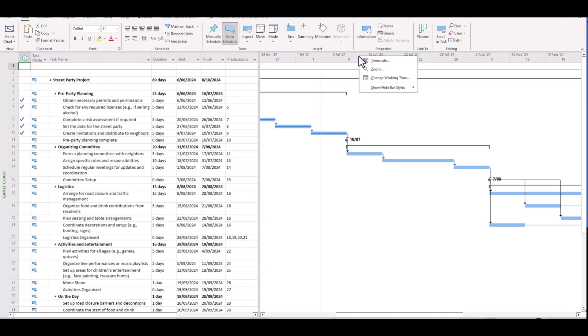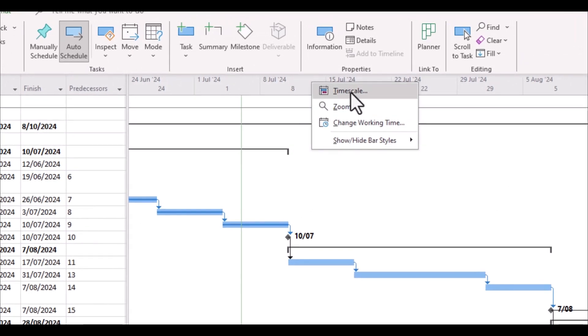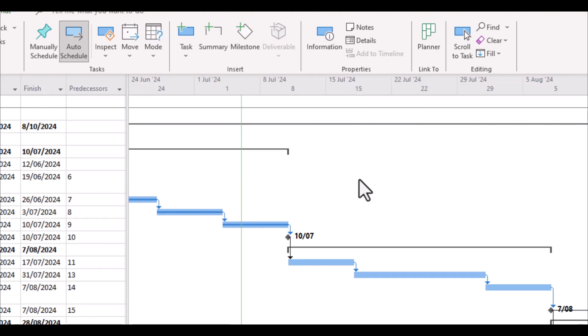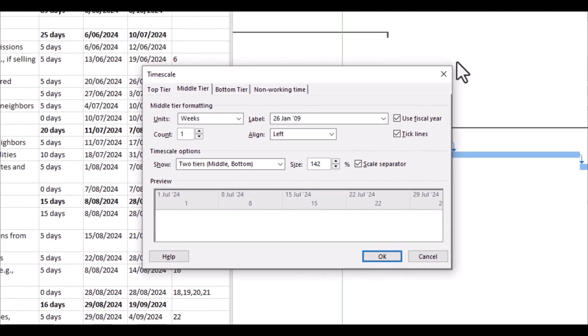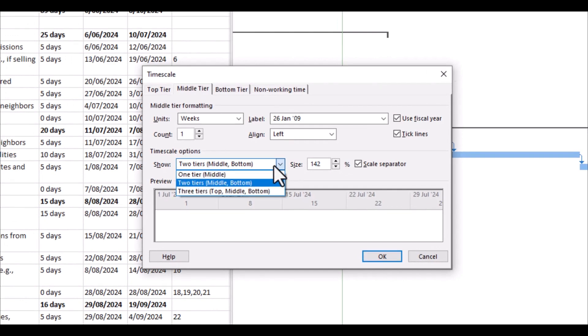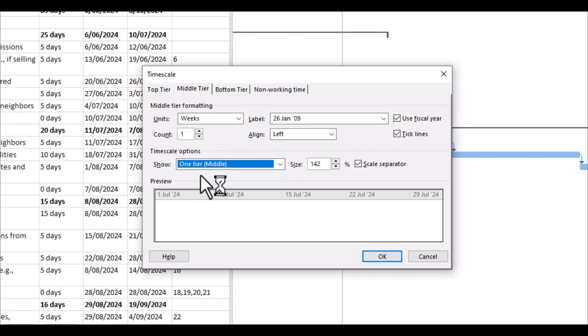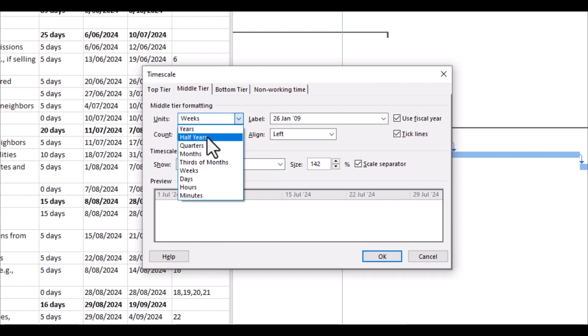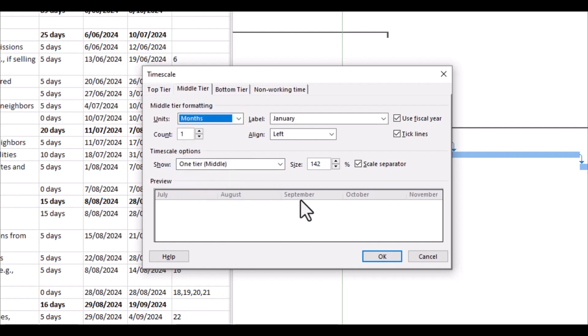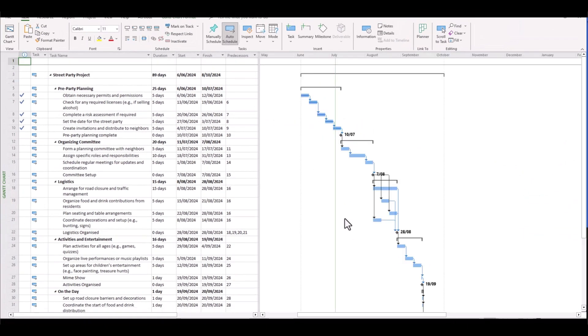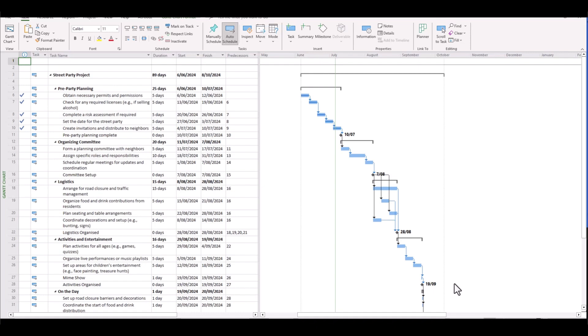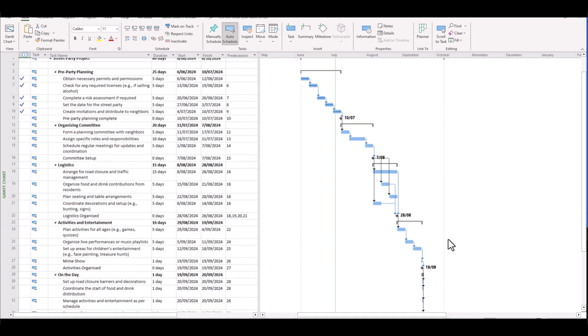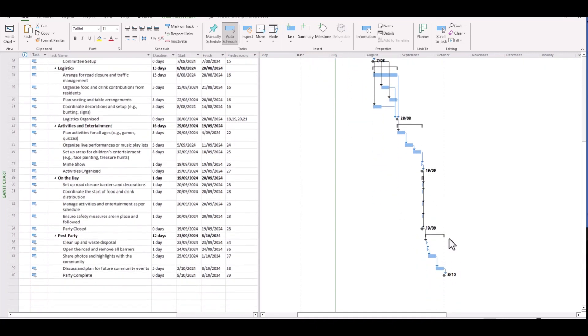Well, right click like so and you'll be presented with a few options. We're going to select timescale and you'll be presented with a timescale box. We might be comfortable in showing just the one tier. We're going to have one middle tier here. And instead of showing weeks, we might just narrow it down to months to really simplify the overall look and feel of our Gantt chart. If we click OK, notice how our timescale changes and also the Gantt chart visuals itself has shrunk to just display an easier time frame for us to follow our project.